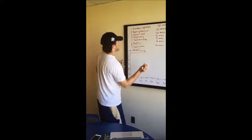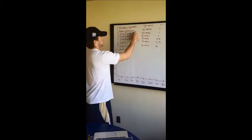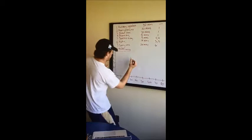Then our second step is preparing the mix. That takes 10 minutes. And in order for us to prepare the mix, we have to have the ingredients first. So that step will start at 30 minutes and will end at 40 minutes.